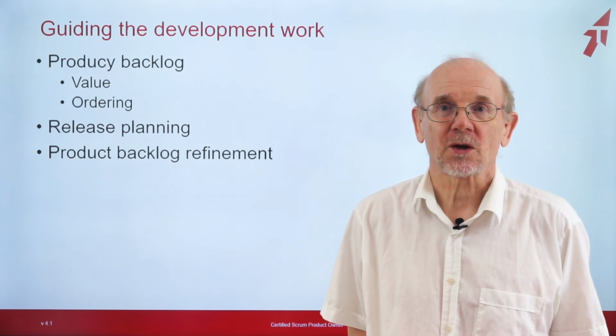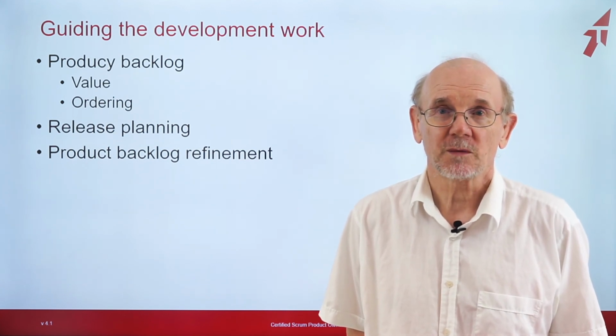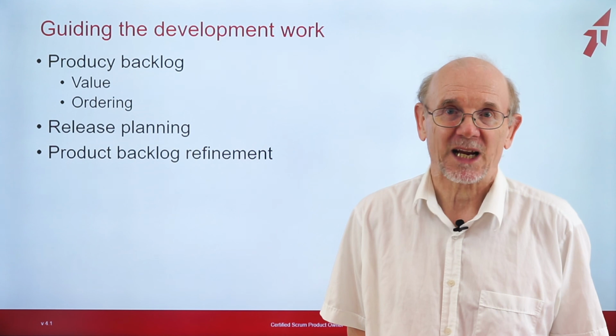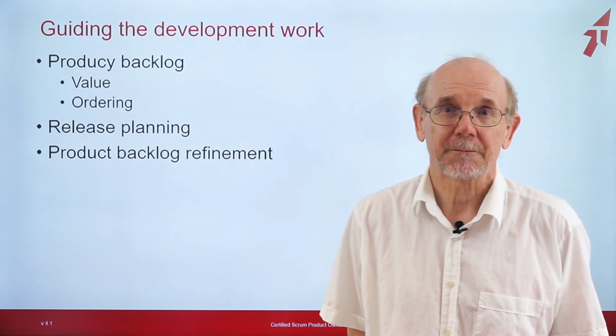Managing the product backlog is the key task for the product owner. We take the vision and the roadmap to a more precise level. We find out what value means in our example and order the estimated product backlog. This creates a product backlog with the release plan.